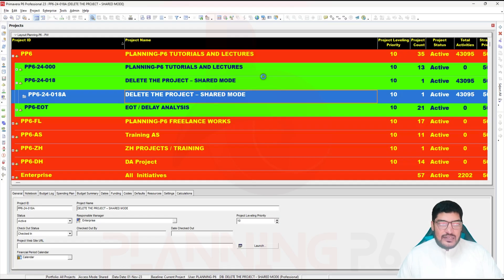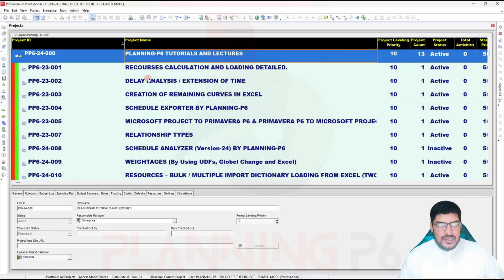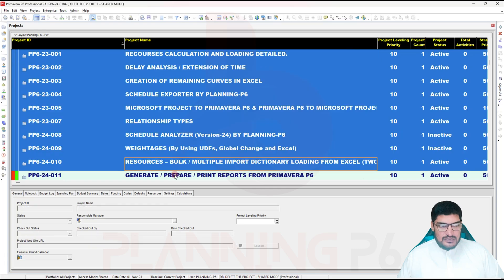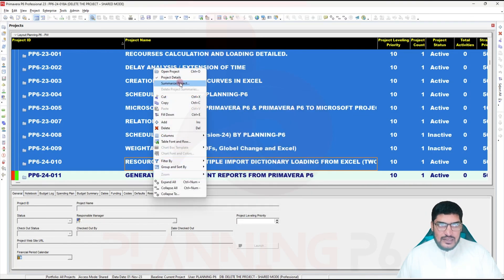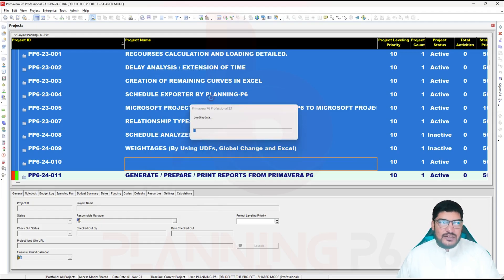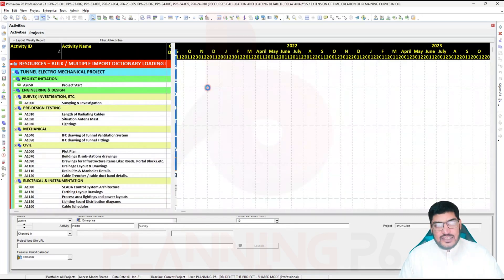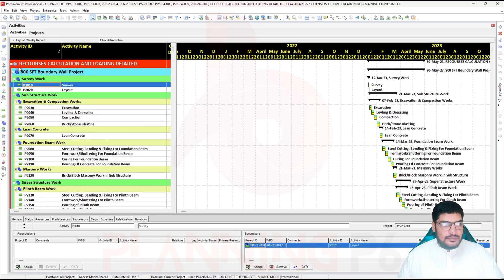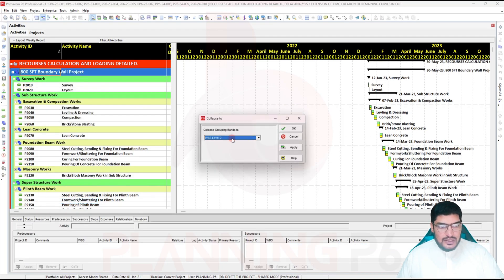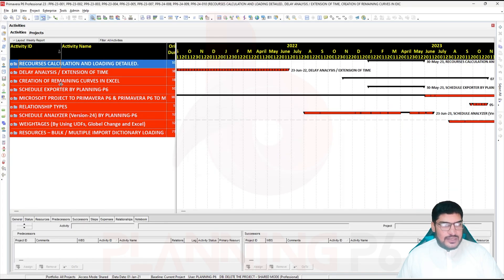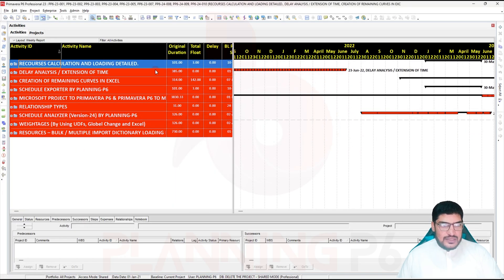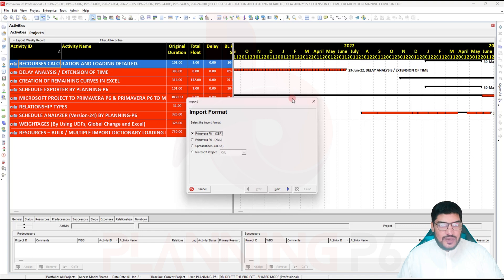A second option: if you want to remove this project, go to the database and select your projects, then export as XML. I can select these five, six, or seven projects and open them. If you are unable to export individually, open all projects in one file, then export as XML. Everything will be there. I'll collapse to level one — apply — and you can see all projects are there.